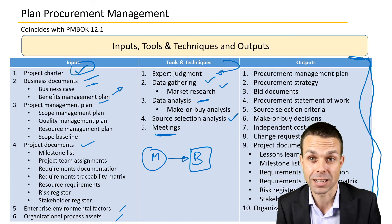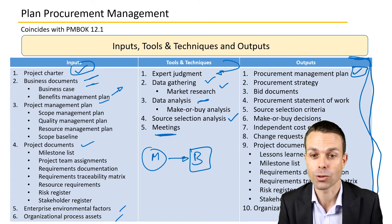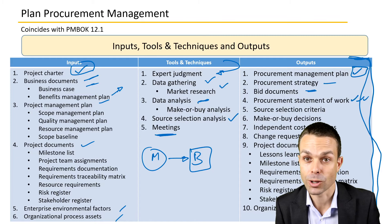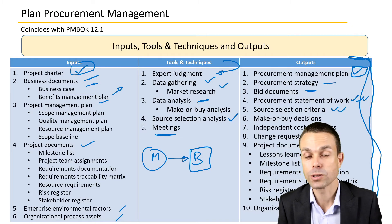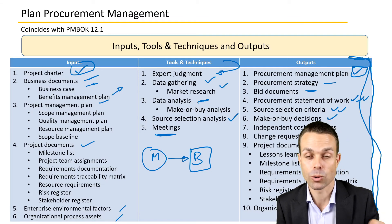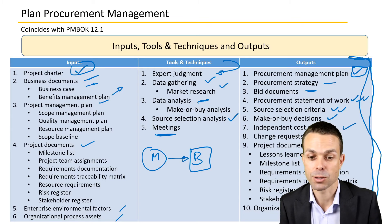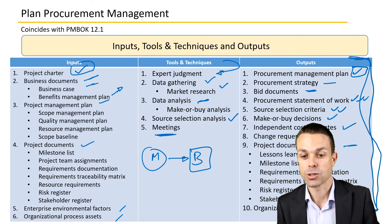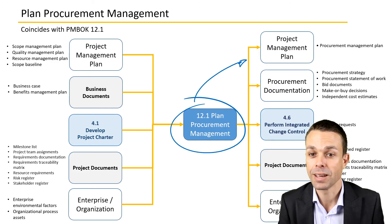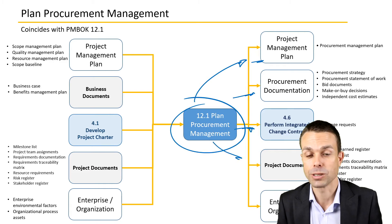There are a lot of outputs for planning procurement management, all related to contracts and sellers, making sure everything remains on track and is very clear. These include the procurement management plan itself, the procurement strategy, bid documents, the procurement statement of work describing what items will be delivered, source selection criteria, make or buy decisions, independent cost estimates, change requests, project documents updates, and organizational process assets updates. The plan procurement management also has input into the project management plan, procurement documentation, change control processes, and project documents.